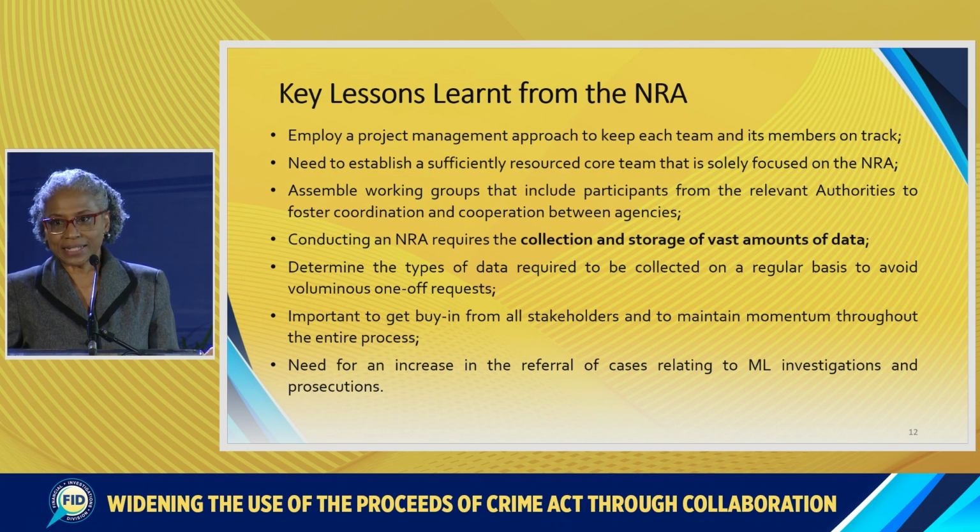This is not an exercise for off the side of your desk. This is a full-time, all-day process. So you also have to look at assembling the working groups, and those working groups need to include persons from all of the relevant agencies.